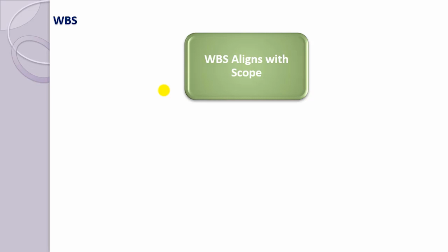Again, a rule for large and complex projects: whenever you talk about the WBS, your large project will have several small teams, so it can be broken down by team. One team may be working on some component development, the other may be a testing team. So it's better to have the WBS ready for each. You can't have a WBS for 4 to 5 months and 6 months down the line. So it's better to have a WBS for 1 month. That's how it should be.